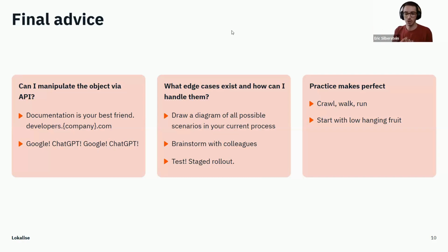The other, I guess the bigger point to get to, is you can have multiple workflows that have a stopping point. So workflow 1 ends at sending the file to DTP, and workflow 2 starts when that file from DTP, or the issue for DTP, is dragged to the next step. So using 2 separate workflows is the best way to include a gatekeeping or human intervention step between the 2.